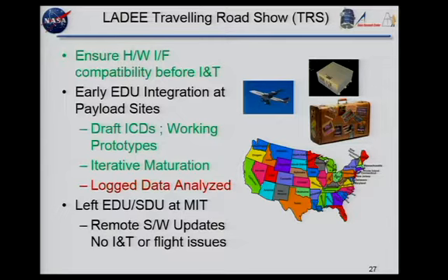Okay, now I have new software. It matches all my requirements, and it's been through code review, but does it still work with an actual payload? So then I could send it out to him. He'd run it on his thing and say, yeah, it works. Or I'd ask, what happened to that little feature you had here? It's like, oh, that didn't make it into the requirements. He's like, oh, I kind of like seeing that. So, okay, then we go back and make a requirements change and put that in there.